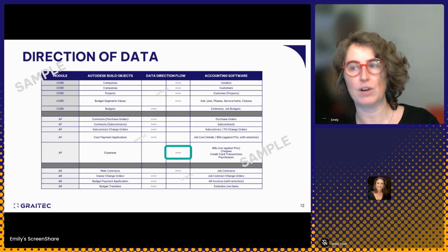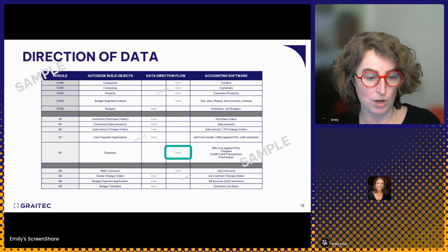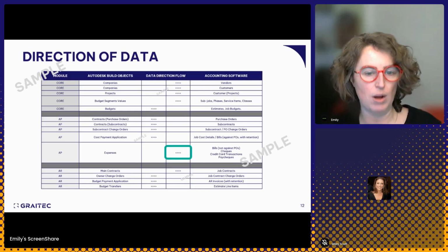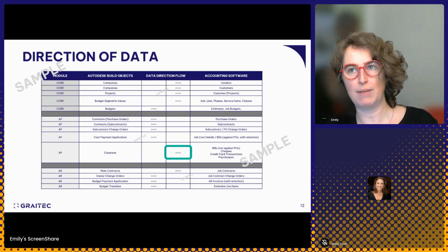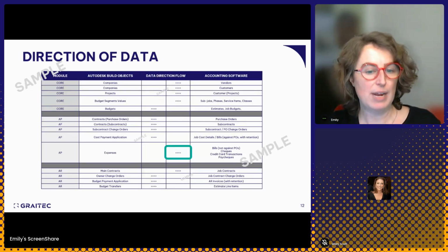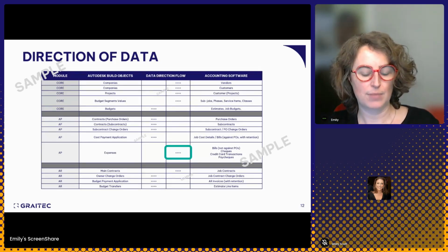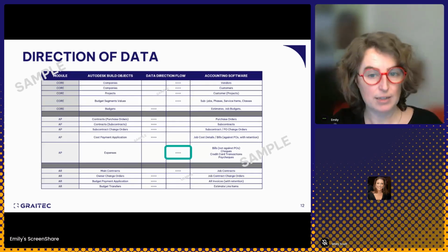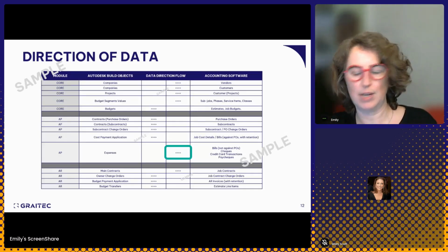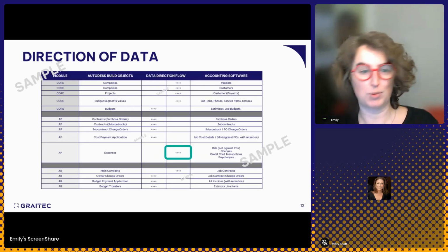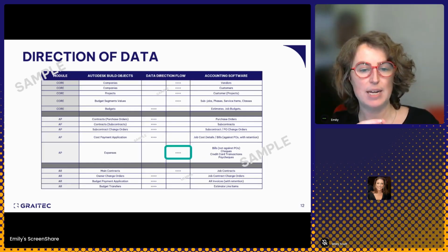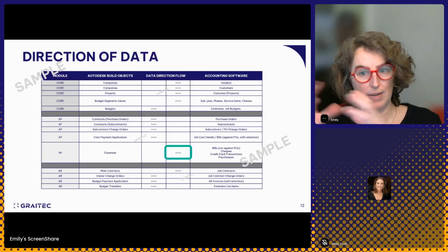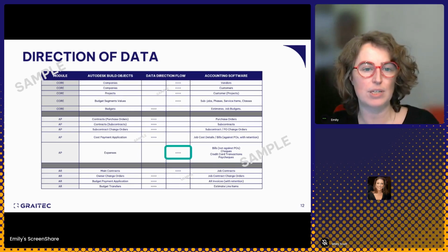We have some variance columns that are going to show you what your variance is going to be on a particular budget item. But if you're looking for that 4% or that specific value, we might need to make some custom columns in the budget area so that we can see that 4% and see if we're approaching that. So there are customizations where sometimes we need to build a custom column into the system to calculate what percent you are heading towards with these numbers.